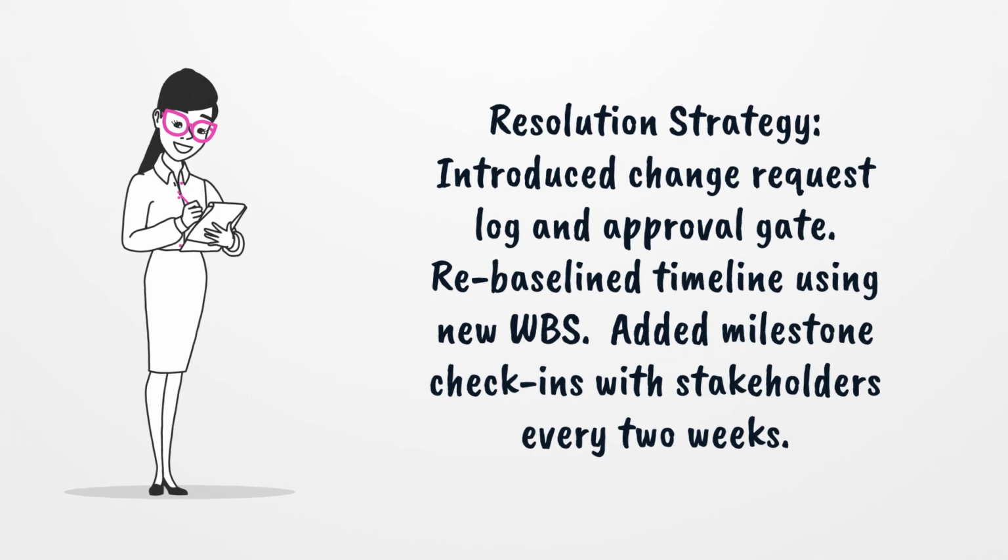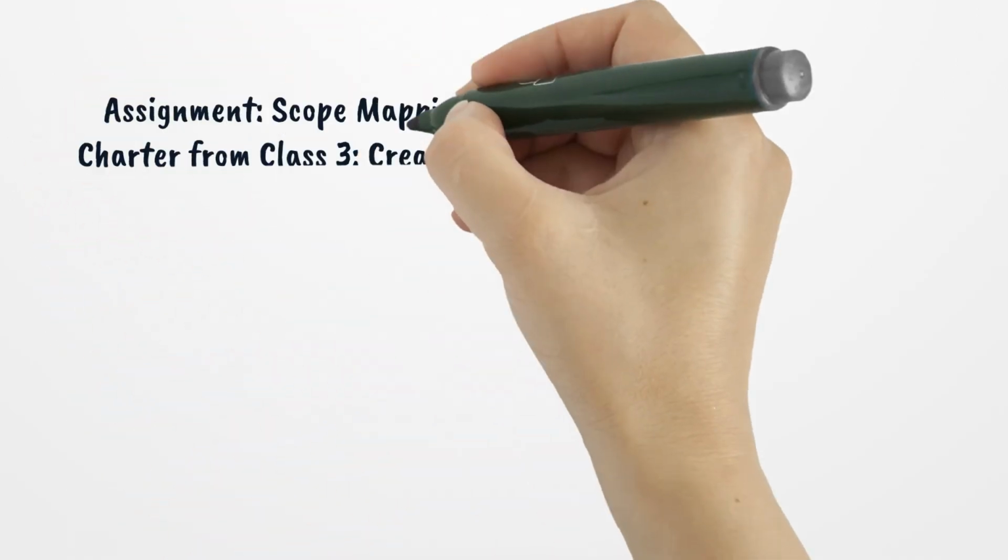Resolution strategy. Introduced a change request log and approval gate. Rebaselined the timeline using a new WBS. Added milestone check-ins with stakeholders every 2 weeks.